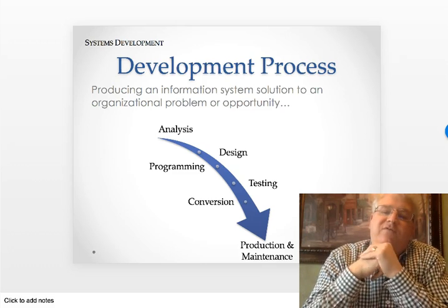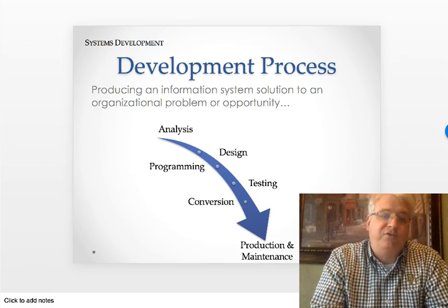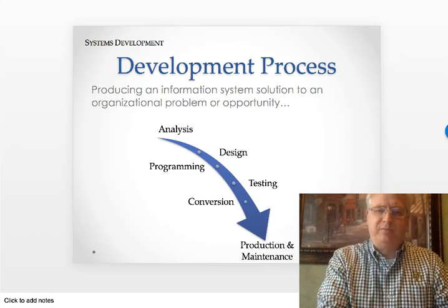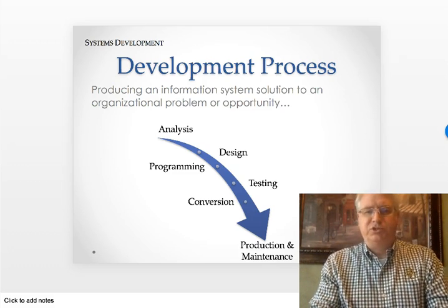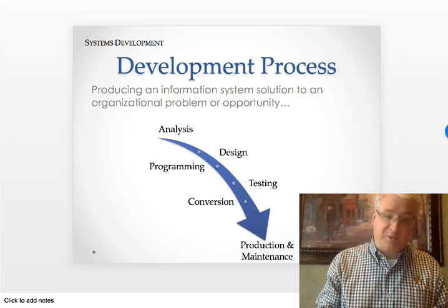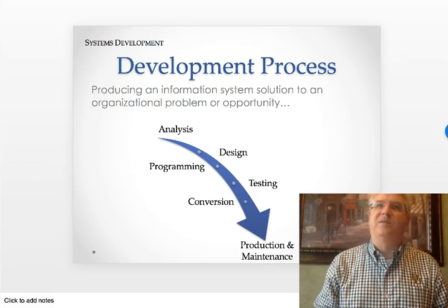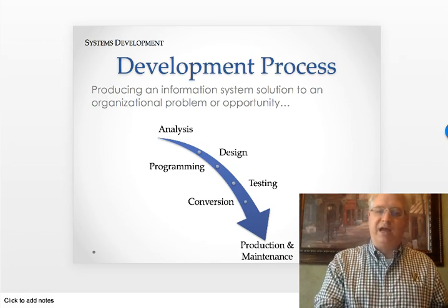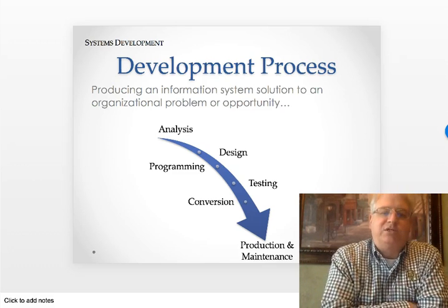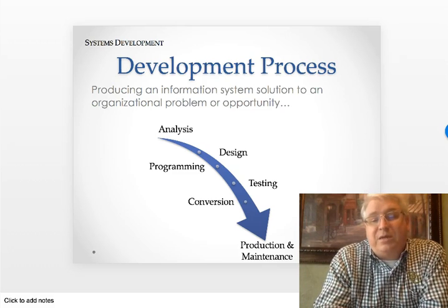A process that is often used and is very typical is this one that I'm going to expand on in a future slide. First, you analyze the problem, then you design the solution, then you program the solution. That's literally when the developers, typically software developers or application developers, take the design and go and do all the coding in whatever language they may be writing the software application in. Then you test it, and then this final step is called conversion.